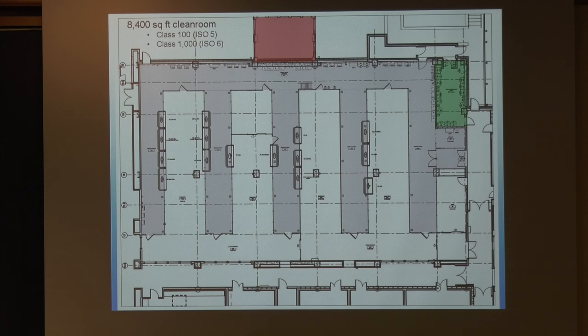A general comment, I know there are some folks from Raith in here. We spent so much time and money trying to meet the temperature specifications, and we were able to go only halfway, which turned out to be just great for the tool. The tool works just fine. So we're trying to meet the specs when actually half of the requirement is just good enough.